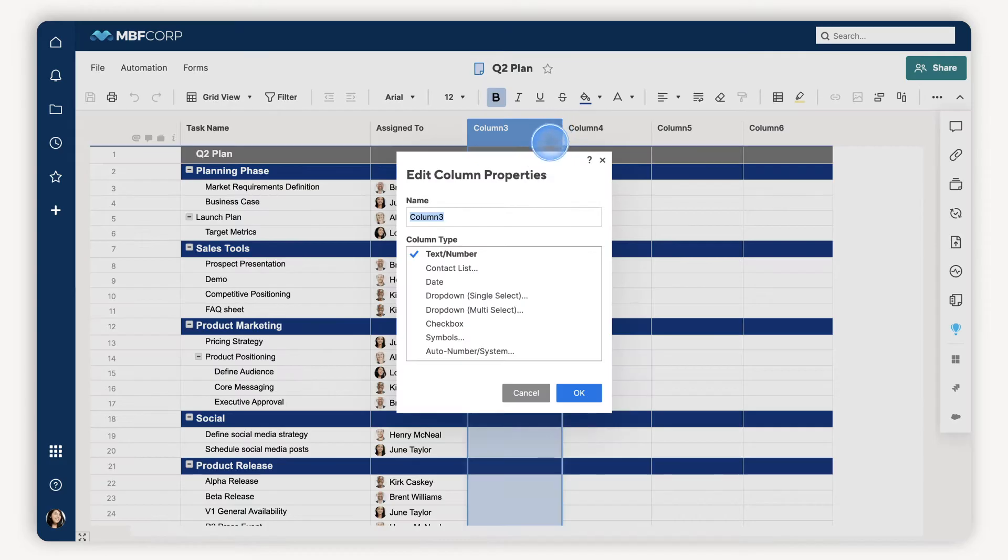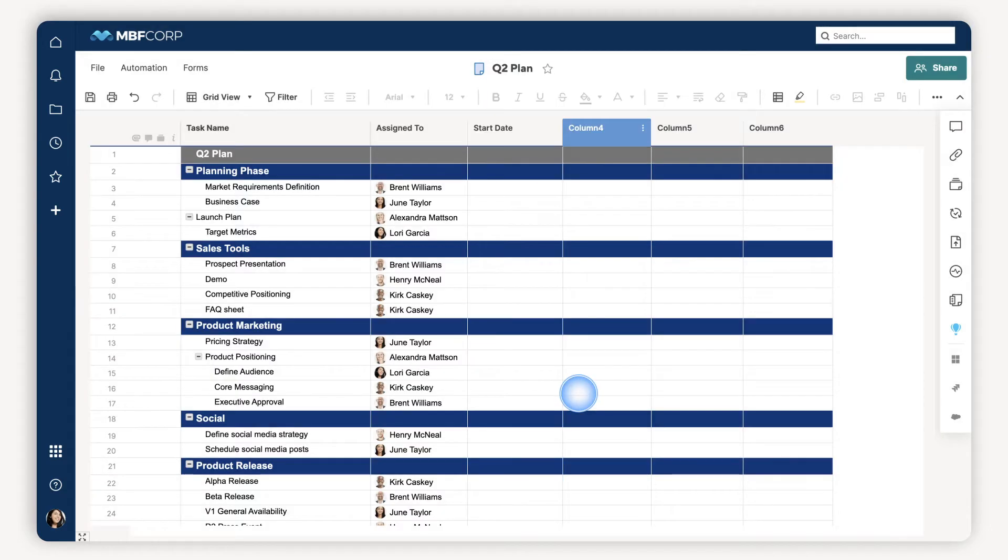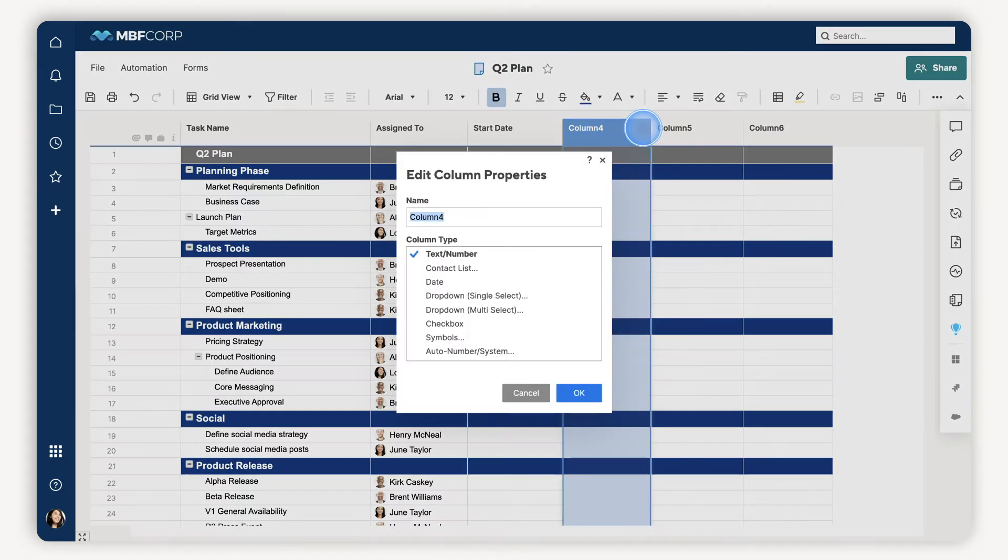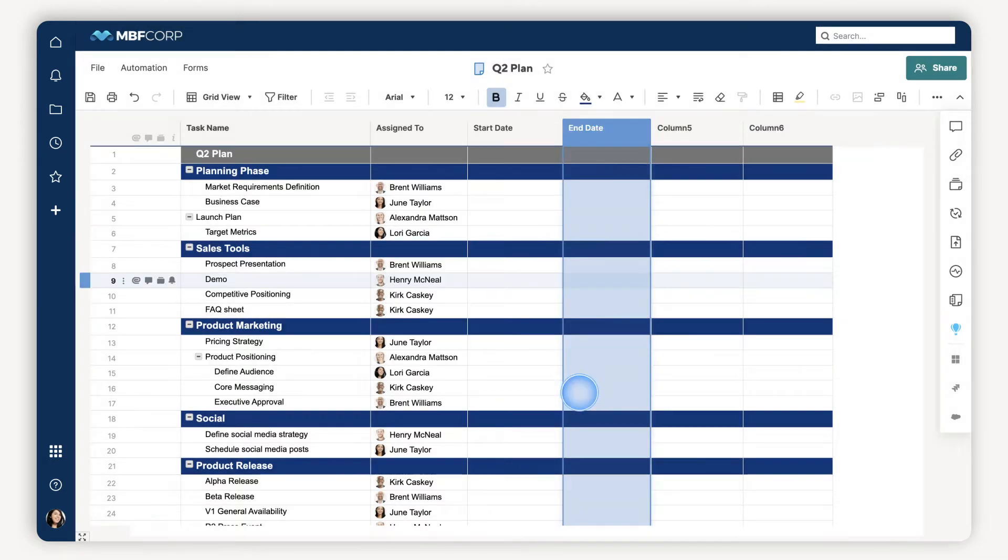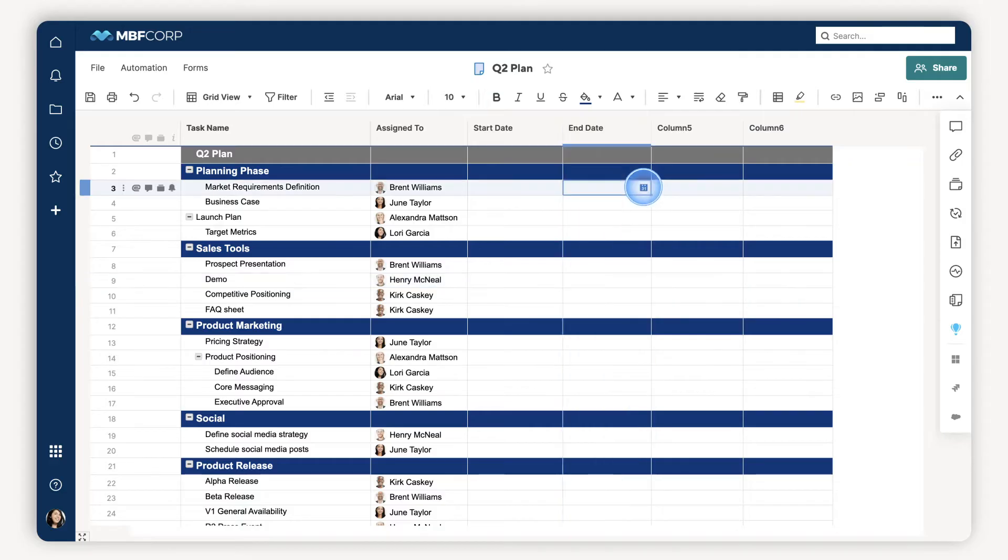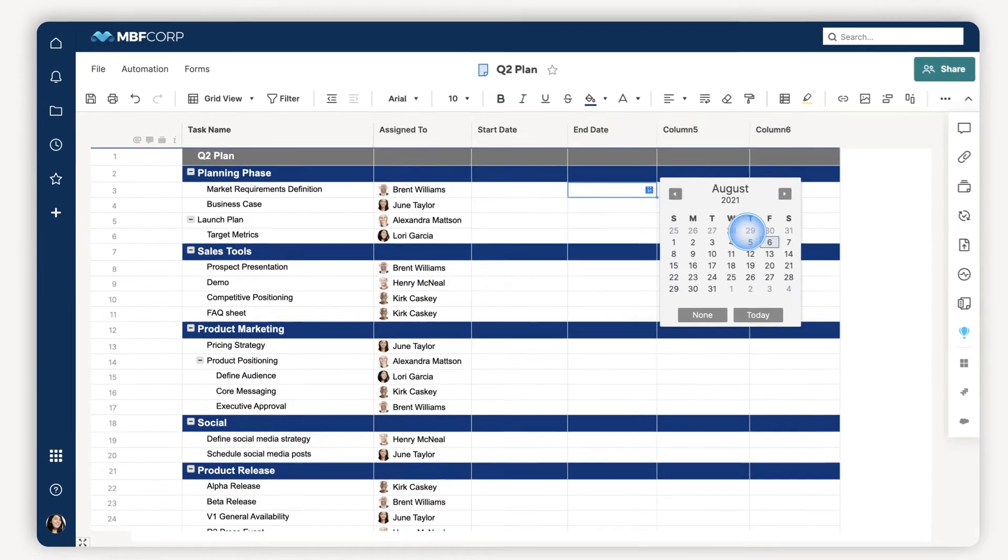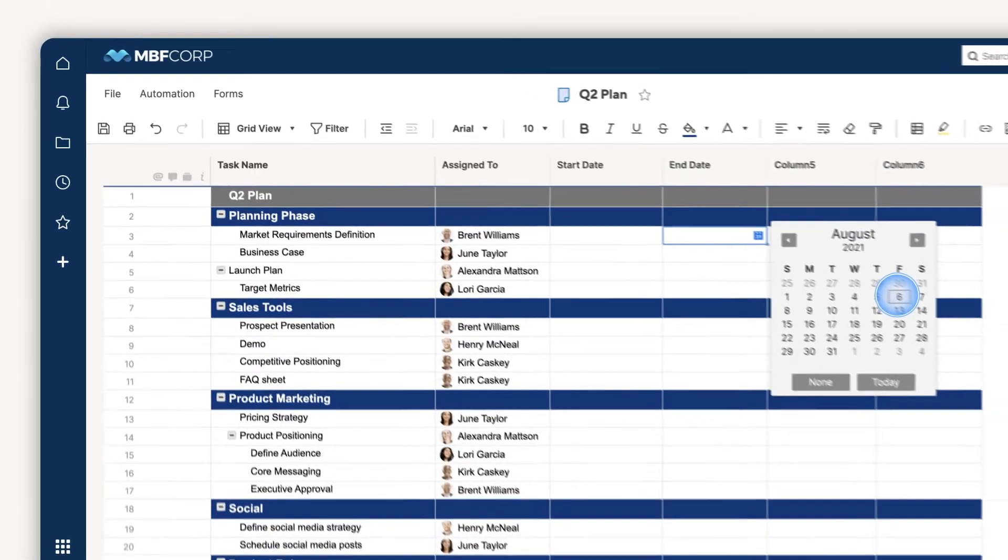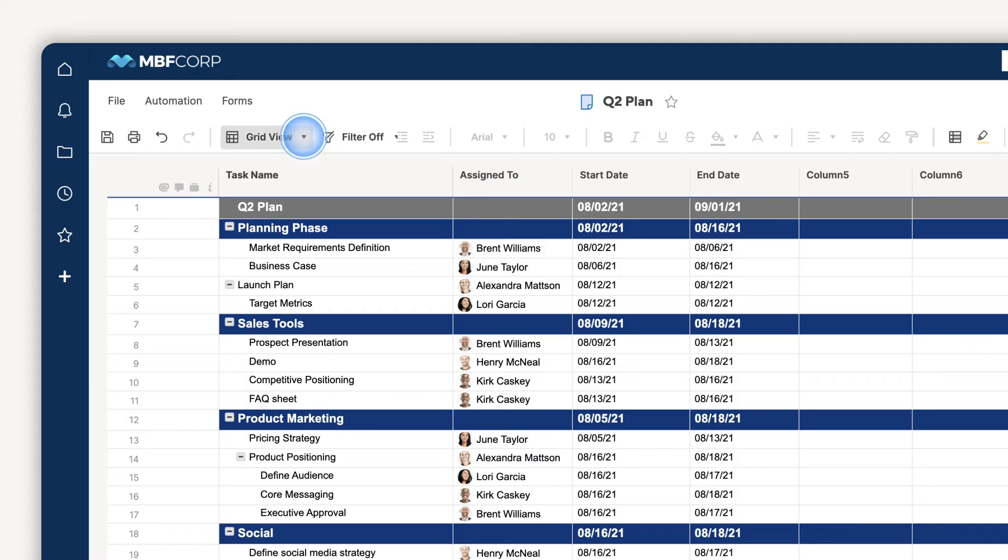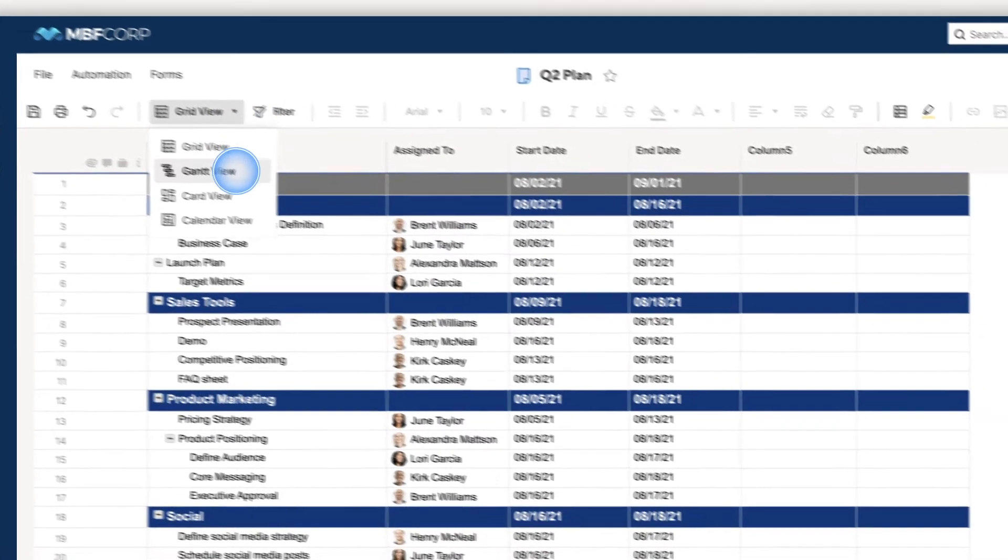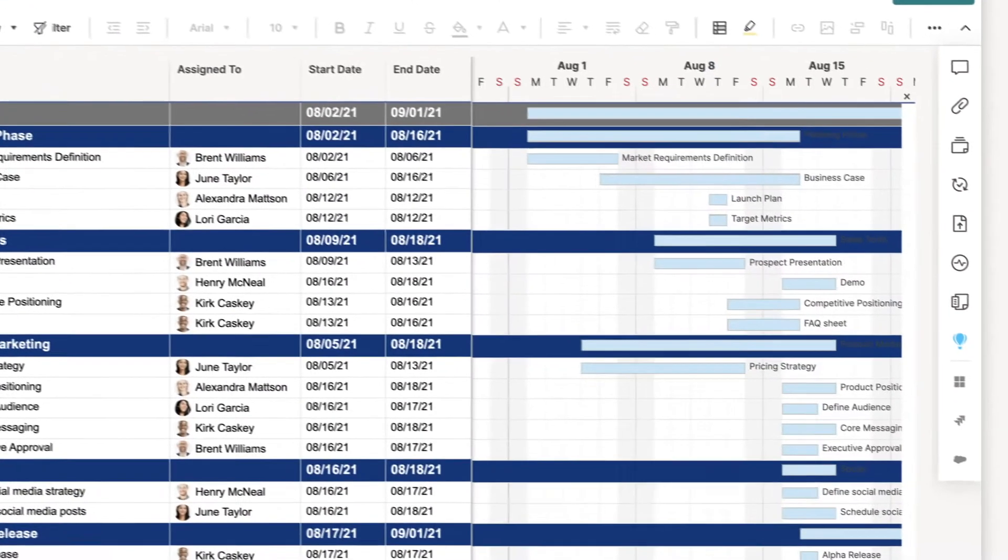Most tasks are time-sensitive. Columns with date properties let you view dates on a calendar, very useful for setting reminders to make deadlines. For this project, I need a more in-depth timeline. So I'm going to set up start and end dates in two columns to view the work as a Gantt chart. This helps keep my team on track to complete key milestones.